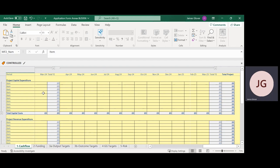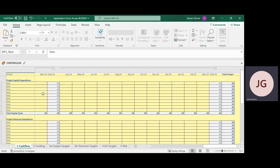Costs should link back to the tendering and procurement you have completed to arrive at the project costs. The headings will also be cross-referenced for claims forms should your project be successful. By completing the capital and revenue costs you should now have a total project cost amount. This should be supported and evidenced by the tendering and procurement approach you have followed, e.g. quotes or professional estimates from quantity surveyors.